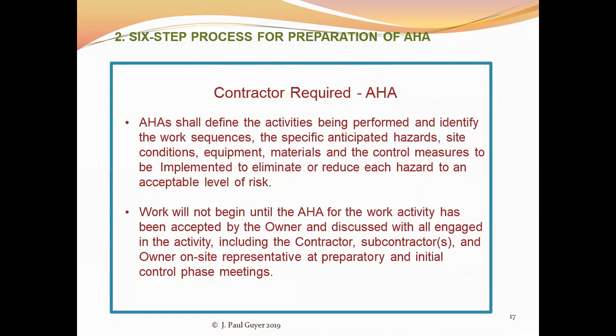The ground is sloping, things like that. Materials that are being used, are some of them hazardous? They can burn your skin if you get them on your skin. The fumes are hazardous, etc., etc. And then the control measures that need to be put in place. And the control measures can be personal protective equipment, they can be procedural, they can be inspections, and those are all spelled out.